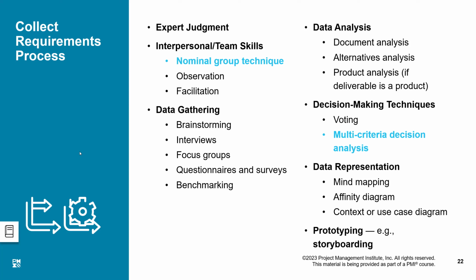Product analysis, as I said, is done when all the requirements have been collected, and we have to discuss with the customer: are all these requirements which they have given us really important to be included in the scope of the product, or could some of these things be dropped, which are not important, or which may be out of scope of the product?